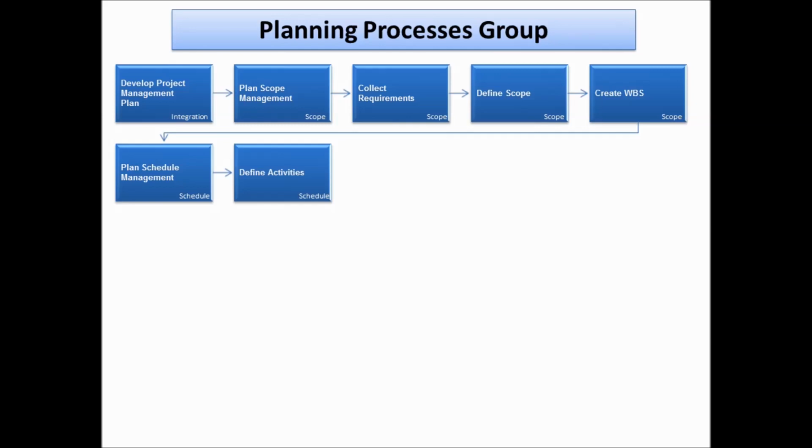The work package under foundation was concrete. Now, what are the activities involved? Mixing concrete is one of the activities. Pouring concrete to the ground, which is dug, is another activity. So mixing concrete and pouring are the activities defined here.